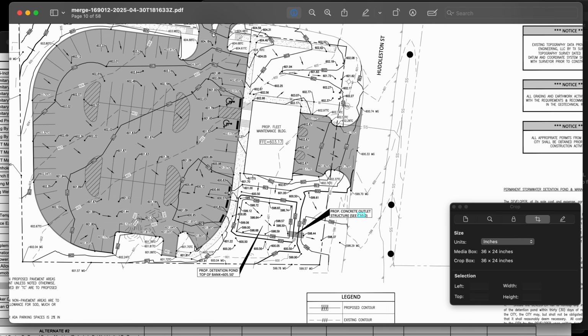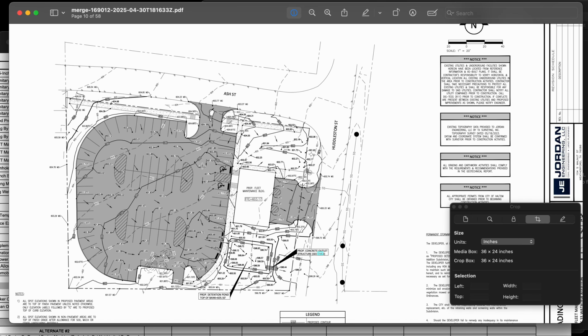And then sometimes I'm looking at this job site, and this is an extension to an existing business. It has happened to us countless times. We did a Baptist church not too long ago. We let them know we have 50 loads of export, but we're not going to include it if you have an area for us to lose it in. And they told us, yes, behind our buildings we have a really steep slope and a lot of dirt is going out. We were able to lose all of our soil right behind the building, maybe 20 or 30 feet away from the cut that we were doing.